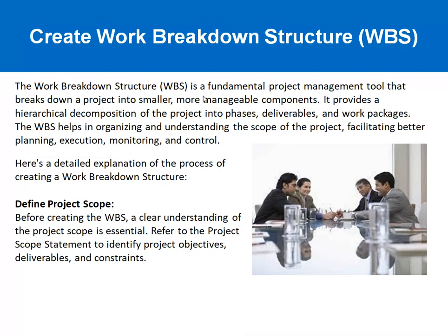It is basically a hierarchical decomposition of the project into phases, deliverables, and work packages. A work package is the smallest unit in the work breakdown structure. That means it can be estimated and controlled. The WBS helps in organizing and understanding the scope of the project, facilitating better planning, execution, monitoring, and controlling.